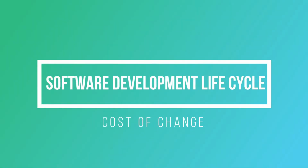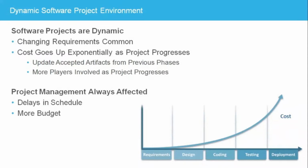It is common for requirements to change during a software project. A requirement could have been overlooked, misunderstood, or the business environment could have evolved, all necessitating a change in the requirements. Changes discovered early in the system concept planning or analysis phase are easy and cheap to accommodate. But as I'm going to show you, the further in the project you are, the more expensive change becomes.